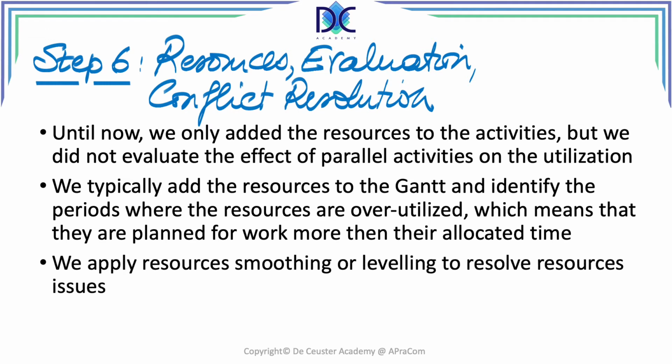Now, what we can do is adjust the planning. We can move the activities, but not further than their late finish time. So basically we can use the slack, we can move the start time, we can extend the activity, or we can have a combination of both. We call it smoothing or leveling depending on the result.